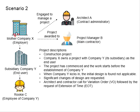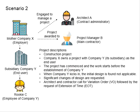Halfway through the project, Company X officially set up the subsidiary Company Y. Now Company Y kicks in. As Company X was venturing into something new, they had limited knowledge regarding the needs of Company Y from the operational perspective. It was only when Company Y joined that they realized the initial design was found not applicable. Significant changes to the design would be required to ensure the operations of the set production line.